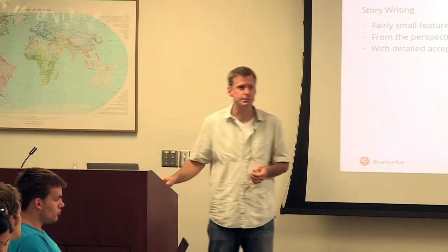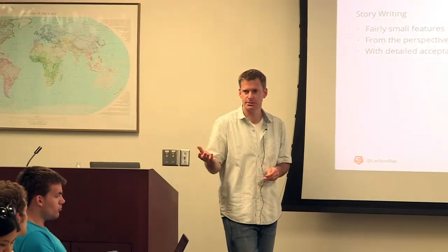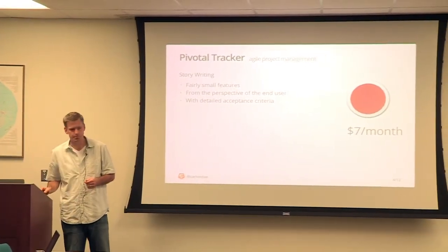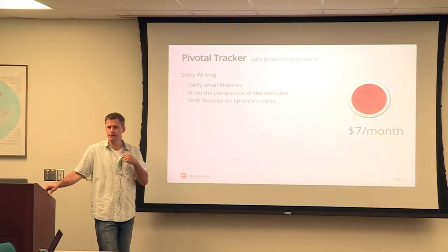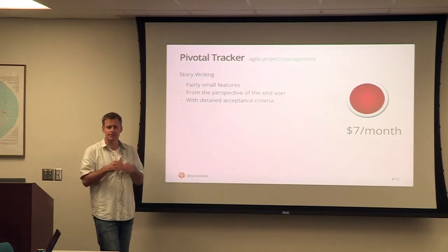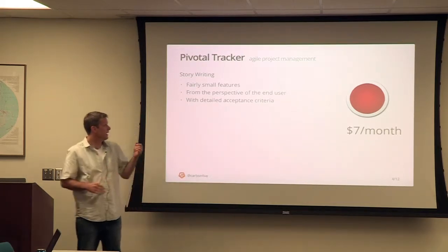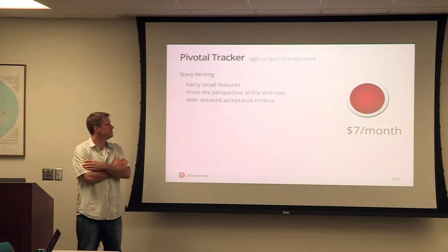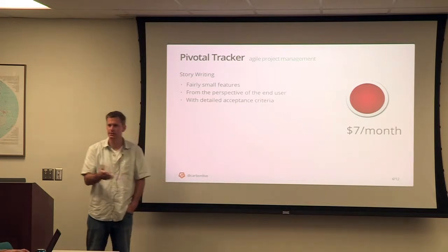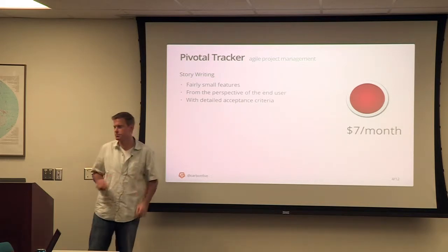And the other thing you do is you identify acceptance criteria, acceptance criteria that a business person can validate is correct. So it's great if a developer does a technical task, but then they're the only ones that can really validate whether they did it right, until some functionality is exposed to the end user. So if you can slice these things vertically and write your stories from the perspective of an end user, you can also write acceptance criteria that your business cohort can validate, so that the way it was written is the way it's understood by the product owner, the person signing off on that.